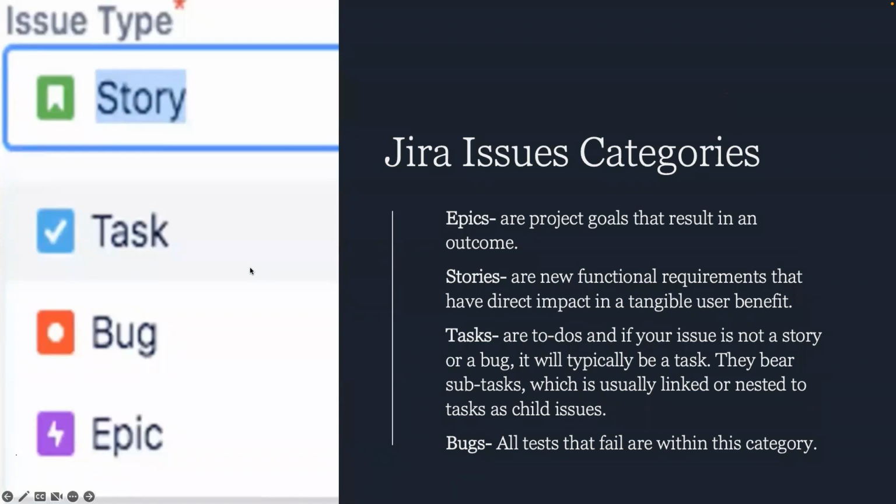So the epics are the goals that you want to have, the outcome of each project. Take, for example, there's a feature you're trying to add. In the course of working on child apparel, we have things we want to achieve, which were shared in the various groups. Some groups said they should work on search and filter. On another, they said customer accounts and login. On another, home page, that's the landing page. On another, the checkout. So those are different epics you're trying to work on.